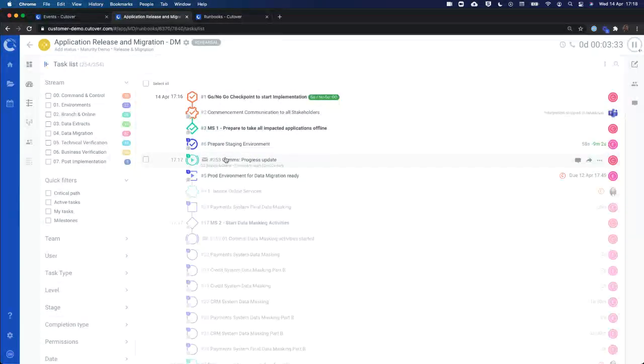Before I go over to the dashboard, I just wanted to quickly touch on the Jenkins one. With the Jenkins one, as soon as the dependencies have been completed, it will connect with Jenkins and initiate the job that you've identified in planning. So in planning, you identify what job you want it to execute. In execution, it will initiate that job. It will connect to Jenkins, find the job, execute that job, and monitor it via Cutover as well, so show you progress in Cutover.